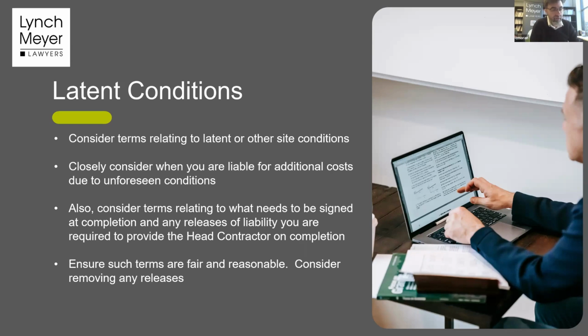And if I'm working for electricians or fire services or plumbers, I'll often get comments. Oh, look, for my scope of works, this isn't really important. But look, the latent condition clauses are always finely balanced about what is a latent condition that you do have protection on. So let's say a latent condition, something unknown in the soil or maybe in an existing building, you might have to do work in relation to an existing building, whether it's an industrial building or a commercial building, and there's maybe some sort of unknown problem that arises that causes an extra 100,000, 200,000 worth of work that needs to get done, whether it's replacing soil or doing additional work in relation to an existing house or building that exists.